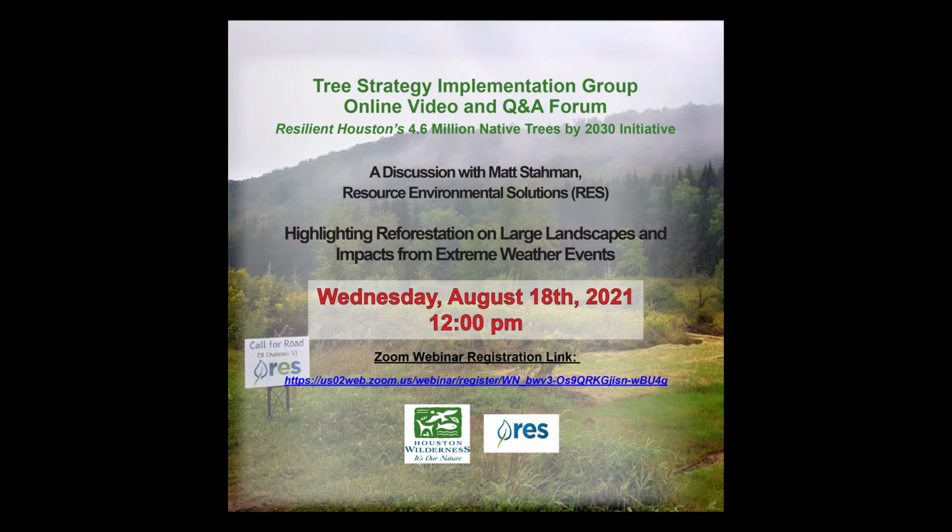Justin Bauer, do you know what the ratio of offset was? How many acres of mitigation per impacted acres? So I'll take that first with the Boat Ark project, and then I'll apply that question just in general. On the Boat Ark project, because it was so unique, Justin, it was a permittee responsible mitigation project. It did not, to the best of my understanding, have any sort of ratio applied to it because you had such a massive impact, 17,000 acres. Just the simple fact that they could acquire and line up for restoration almost 1-for-1 acreage amount, I think was a Herculean effort, and the fact that that water district did it is a real testimony to their commitment to offset their impact to the greatest extent that they practicably could.